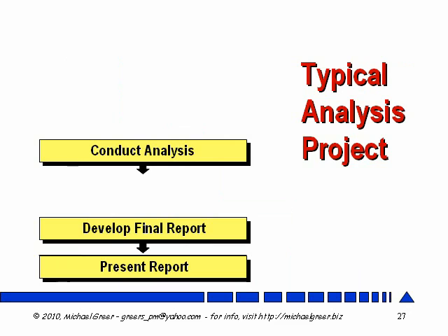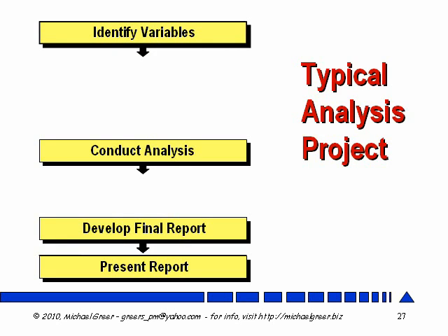Now here's an example of how I learned the hard way that I needed to build in more control in my project so that the deliverables weren't rejected by the client. The first needs analysis I ever conducted looked like this. I simply went out, did the analysis, went away, created a final report, and brought it back and presented it to the client. Unfortunately, when they saw my finished report, they rejected it because I didn't talk to the right people and they didn't like my methodology.